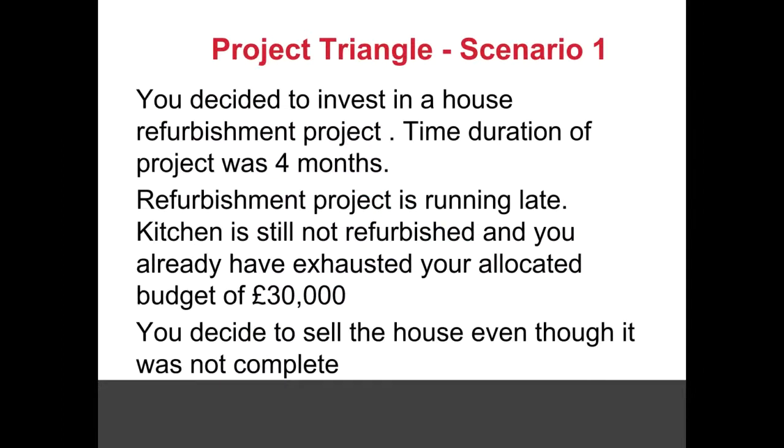So here are different project management scenarios presented. You decided to invest in a house. The project duration was 4 months. The refurbishment project is running late, the kitchen is still not refurbished, and you have already exhausted your allocated budget of 30 grand. You decide to sell the house even though it was not complete. So here you are trying to ensure that you stick to your time targets, and you're trying not to exceed your cost, but in this example, your quality is going down the drain.